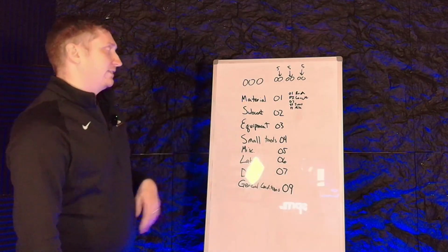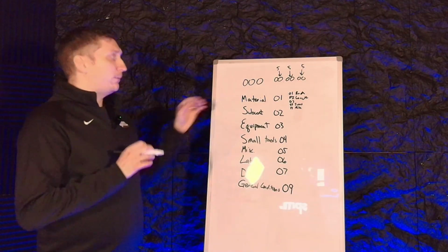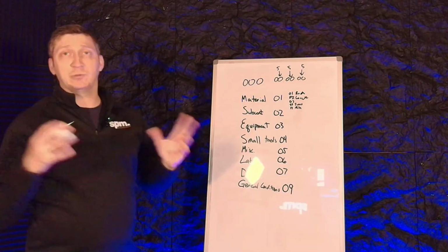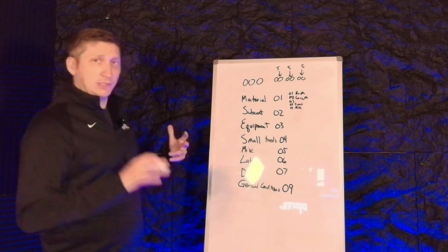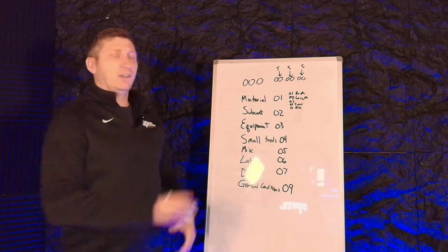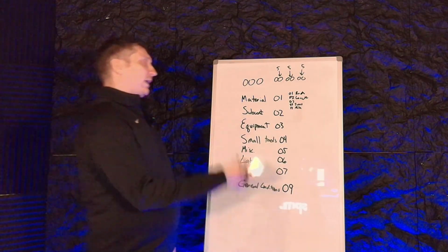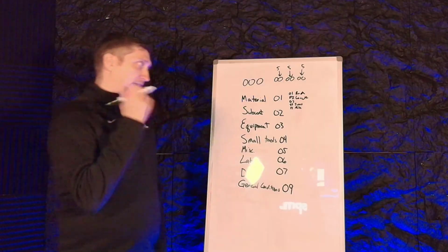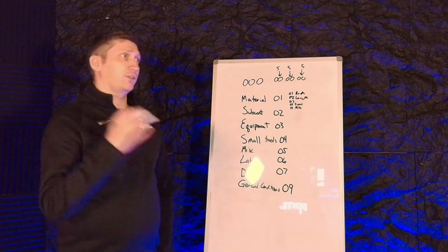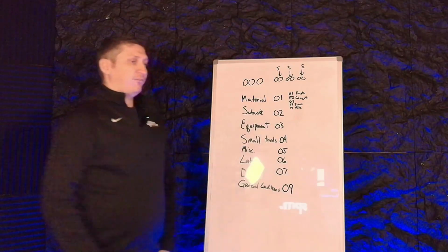Same with subcontracts. I'm going to have 01. That's going to be my survey. 02. I put them in the order of how we're going to spend the money as well. It helps to see when you're doing job cost to completes, which we'll get to in another video. I'm going to do a series here on why we do it this way and how it all fits together. But we're going to have 01 for, like in survey, 2 for concrete, 3 for asphalt and paving, 4 for trucking, whatever it is. And then I have a 98 code again for temp labor.